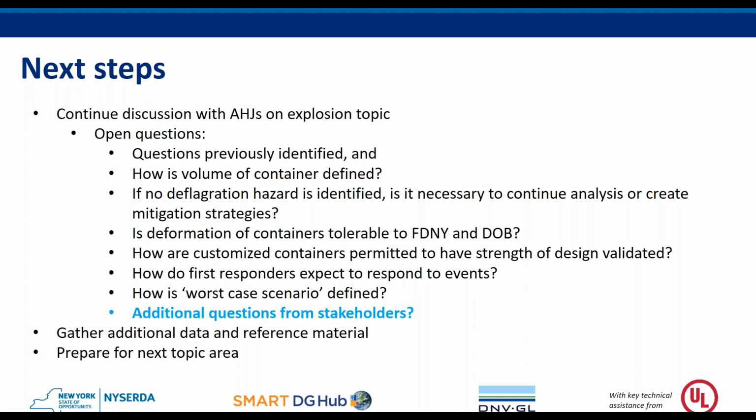In terms of UPS systems, they do not. Depending on the chemistry utilized, UPS systems are covered by the code, and valve regulated lead acid are covered by the code and can be installed through the regular permitting process within the city. As well as some lithium ion chemistries are also within the code, but they do not have to go through this process that we are outlining right now, as well as the permitting with OTCR and FDNY in the same way that was outlined previously.